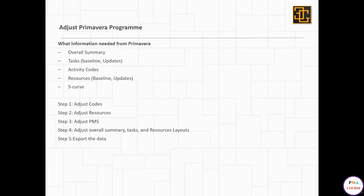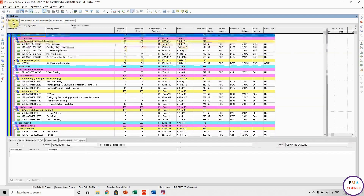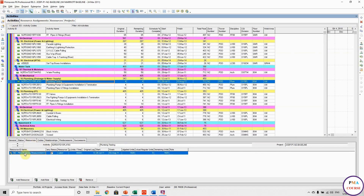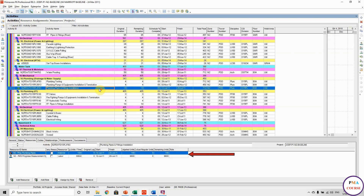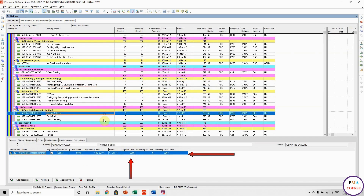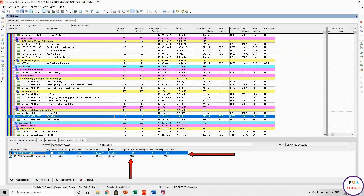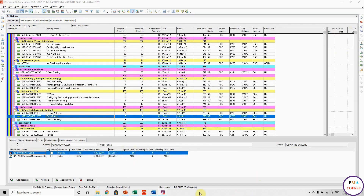For the PMS, there are many ways to calculate the progress percentage. However, in my project we agreed with the client to assign a weight called PMS — progress measurement system — and we pre-agreed the budget of each activity with the client. We use this as a weight to measure progress. In any activity, if you go to resources, you'll find I assigned this PMS resource with a pre-agreed budget. This budget is used to calculate the progress, and I assign the PMS to all activities.